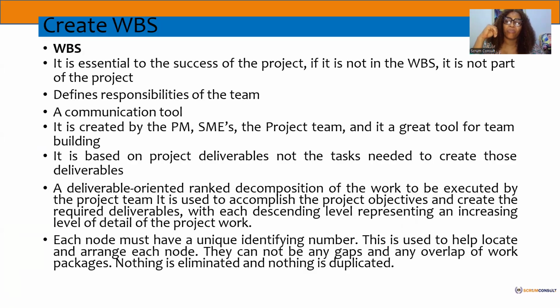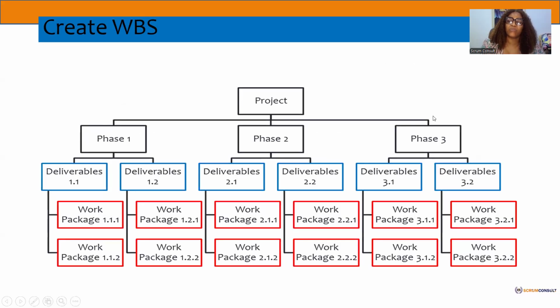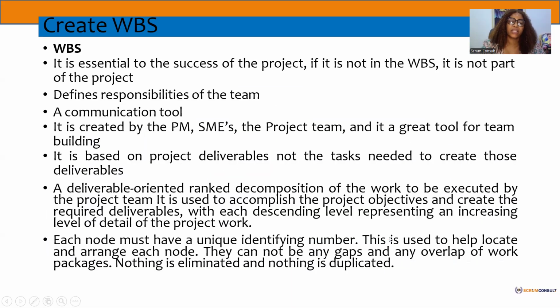And that's why the work breakdown structure stops at the work package. See where it stops. It stops at the work package. Tomorrow we will add an activity list to each of these work packages. For work package 3.22, what are we going to do? You start listing those activities. That's what we call bottom-up estimation for scheduling, right? So we need to do that.